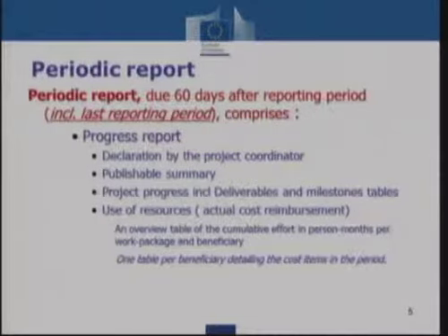So to come to the purpose and the objectives of a project review: the aim of a technical review is to assess the work which was carried out in the period which is under review. That's also what is stipulated in the grant agreement, and it also indicates that we can do this kind of review up to 5 years after the end of a project. However, this is very unusual.